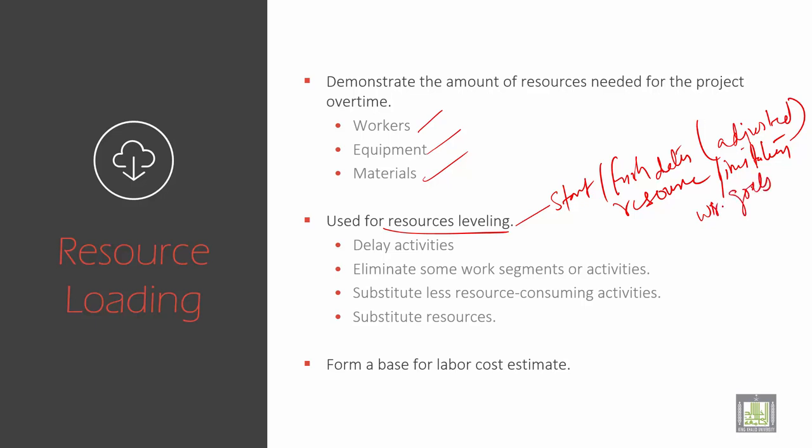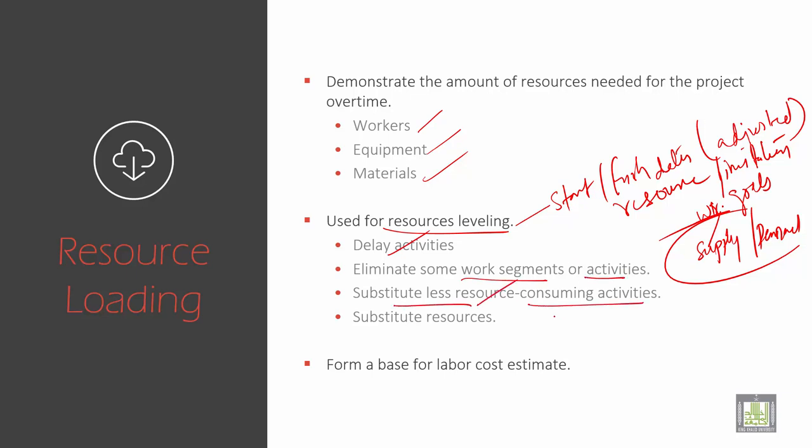With respect to the goal of balancing the resources, for example, we balance the supply and demand. It's very, very important. Here he has given delay activities to eliminate some work segments or activities, then substitute less resource-consuming activities, then substitute resources. So these are given here because these are uses of resource leveling. Then to form a base for the labor cost estimate, you should form a base for the labor cost estimate.